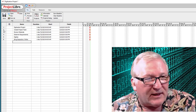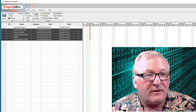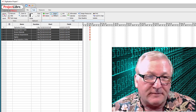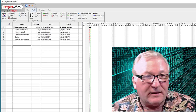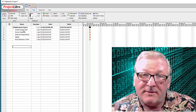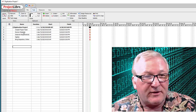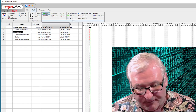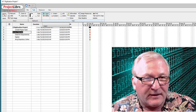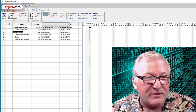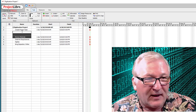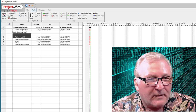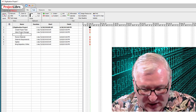These are all the sub-elements of our digitization project. I'm going to highlight those, switch to the Task menu, and click Indent. They all become sub-tasks of the digitization project. Each sub-task has its own list of sub-tasks. I'm going to click on a task and click Insert — it inserts above the selected line. I'll insert two sub-tasks for Create Project Team: Select the Project Manager, and Select the Team Members.